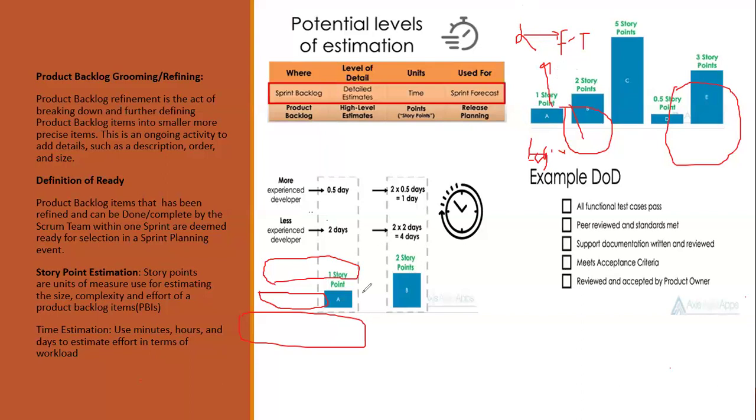That is where timing comes in, time estimate. So story point is not the same as time. Of course, I think I've seen some people work saying that one story point is equal to 1 day. For me, I don't think it's the same, because if you say one story point is equal to 1 day, you're telling us that the volume of work, the risk, complexity, and everything, takes 1 day to deliver, which is naturally not true, right?